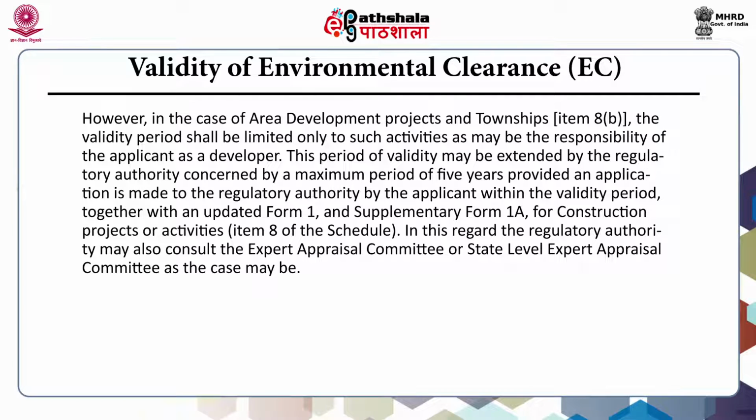This period of validity may be extended by the regulatory authority concerned by a maximum period of 5 years, provided an application is made to the regulatory authority by the applicant within the validity period, together with an updated Form 1 and supplementary Form 1A for construction projects or activities.